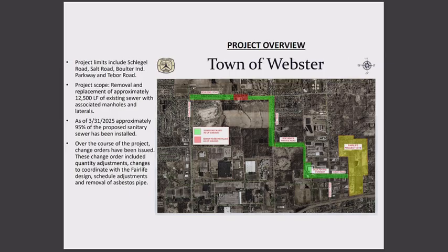To avoid damaging the giant distribution main, it was decided to reroute around that. So we had to add a couple manholes and a little bit extra run of sewer. Those were all essentially quantities that the contractor had given us prices for, so they just updated it based on the additional materials.